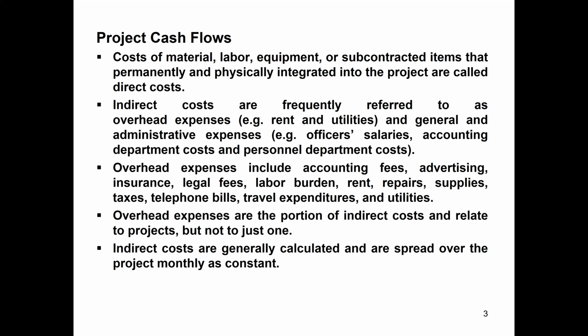The overhead expenses include accounting fees, advertising fees, insurance cost, legal fees for the company, the labor burden that we pay to the labor, rent for the office building, repairs or supplies to the office like stationery, taxes, telephone bills, travel expenses, and utility bills like water supply, electricity and telephone.